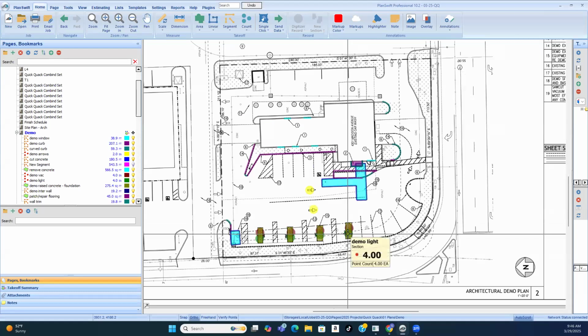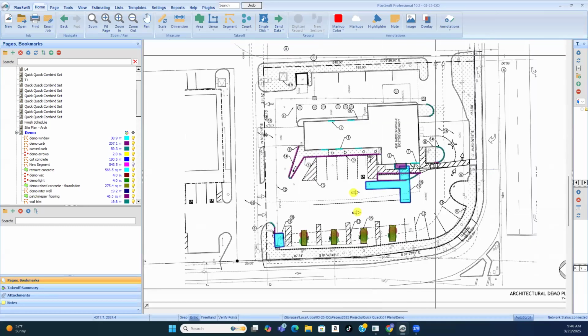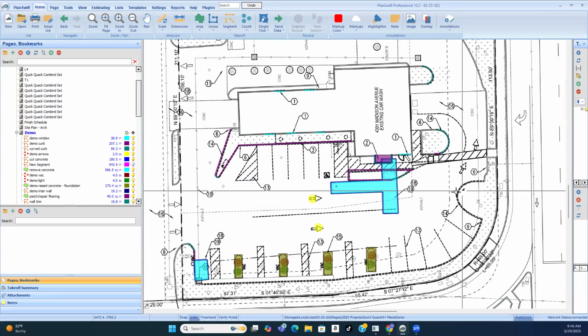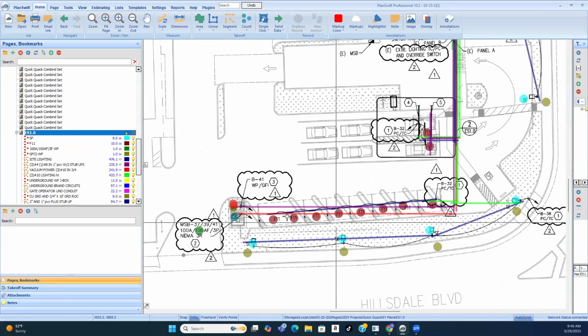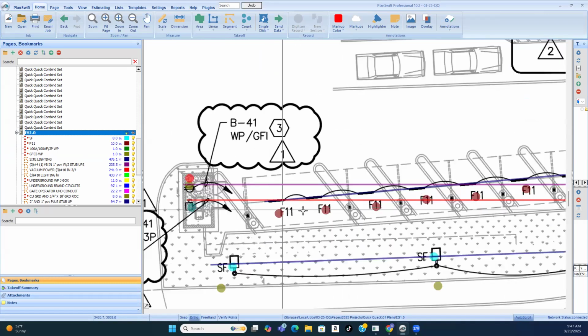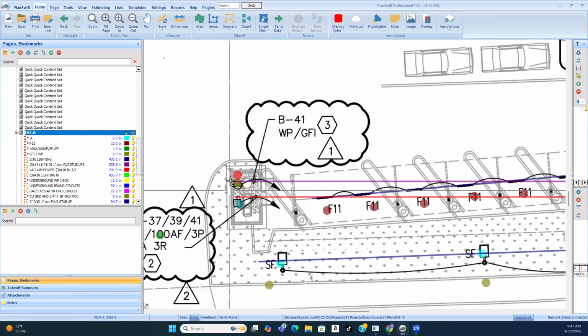Like I was saying, I think that, you know what I think? I think this part, this single line is trenching. That's what I think. They want you to open it up. I think this single dot, dot, dot is telling you trenching. You know why? Because going back to my electrical, look, they're adding all of this. This is electrical conduit underground. Underground. Right? Because they're adding an outlet for something. That's what we had to dig up.